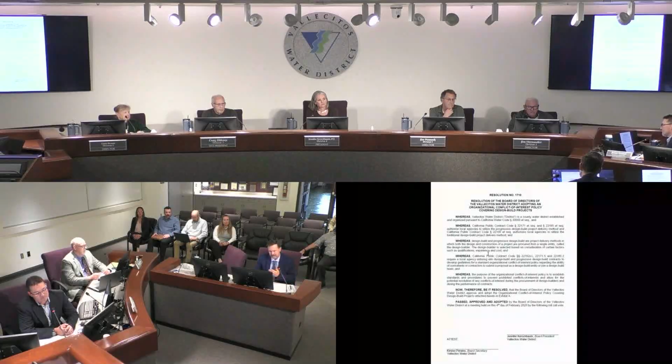Okay. And like the general manager said, most of our projects, linear pipeline projects, facility upgrades, pump type rehab type projects, those are more in line with traditional design bid build. But I do know of a project that we have currently that staff is looking to use this delivery method as well. It's a very unique hill stabilization project near a reservoir. So there's certain projects that lend itself to that, and we would let that decision fall on staff.